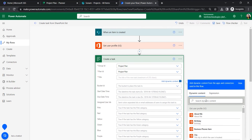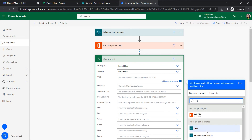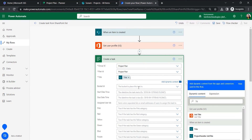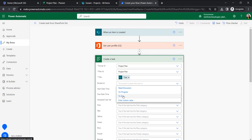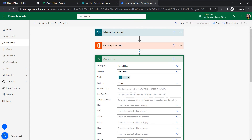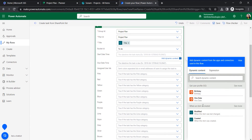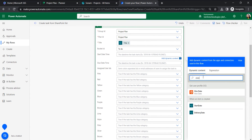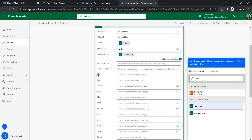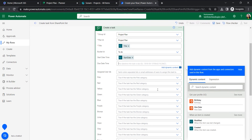Give the title based on the SharePoint list title. The Bucket ID is set to 'To Do'. For the start date, there is a start date column in the SharePoint list, so start date should be mapped to that start date field, and the due date is mapped to the delivery date.